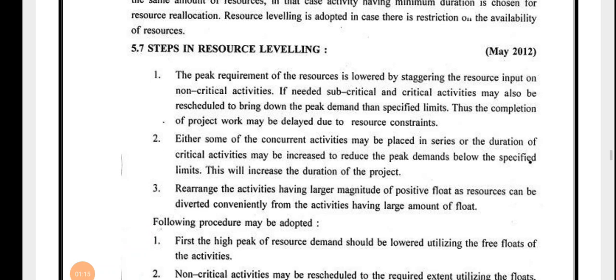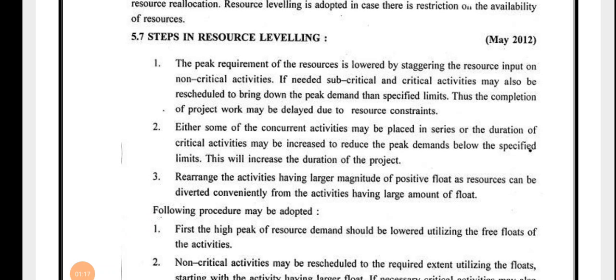Now, steps in resource leveling. The peak requirement of the resources is lowered by staggering the resource input on non-critical activities. If needed, subcritical and critical activities may also be rescheduled to bring down the peak demand below specified limits. Thus, the completion of project work may be delayed due to resource constraints.